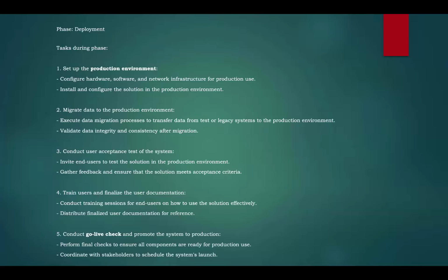So once you start configuring the production environment, you will migrate the entire data from the old system, their legacy system, to D365. Basically, once you configure in the production environment, the end users are going to start in production, but before that, we will reach out to Microsoft with the go live checklist. So Microsoft is going to give us a go ahead.